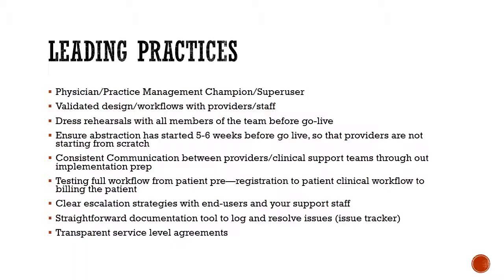Dress rehearsals are important. As mentioned earlier, it helps to mitigate other issues that would have just come up at go live, and it's more of a last gap check to make sure that your providers and your clinical staff are ready to go, and they can practice on the system in a very real scenario without using real patient data.